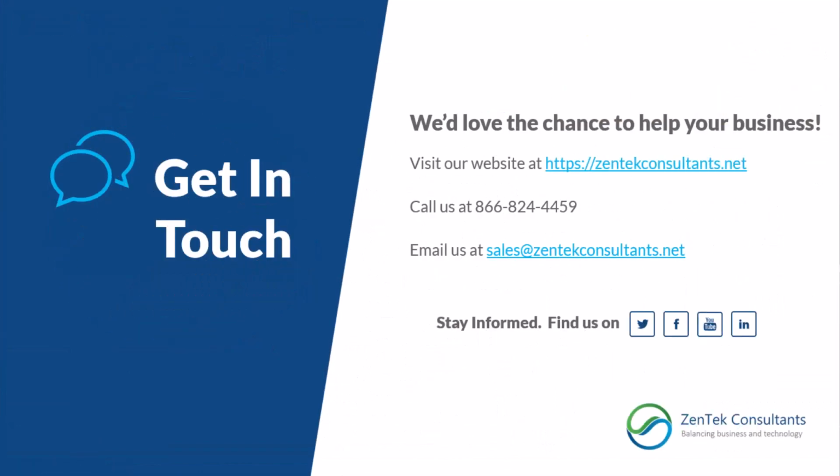Right? And that's really, there's a lot more to it than just like, oh, it's nice to have some markups. It really is about pushing the speed of your project, right? You're reducing the time that it takes to get people working on items. There are times when I've done this out in the field where the resolution is resolved before I get back to the trailer. Right? I find the problem, I note the problem, I save the document, and I just move on to the next floor to continue my inspection. By the time I get back, the sub's on the line saying, yeah, we saw that, we're going to fix it, we'll be on site tomorrow. I go, cool, thanks, done. Right? And that's how we really generate efficiencies.